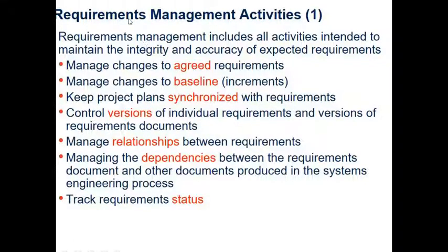So there are some activities involved in requirements management. What are these activities? You manage changes to agreed requirements. You manage changes to the baseline, which means you are adding increments. You keep project plans synchronized with the requirements. You have to control versions of individual requirements and versions of requirements documents. There will be a lot of versions coming up, because with each new change you have a new version.